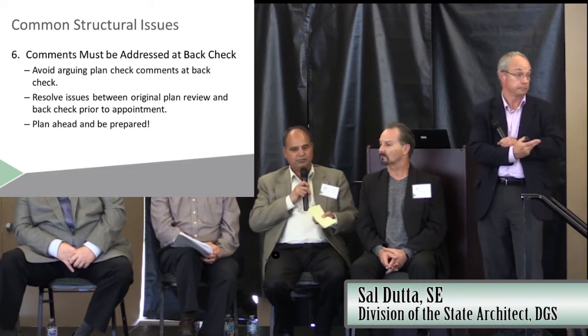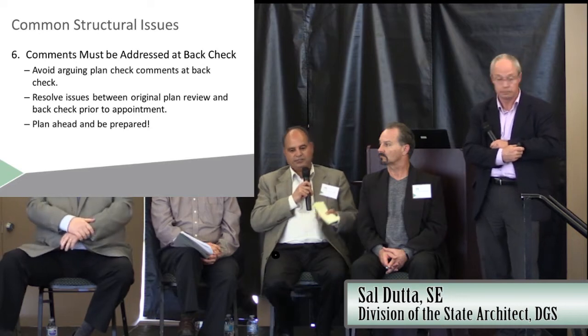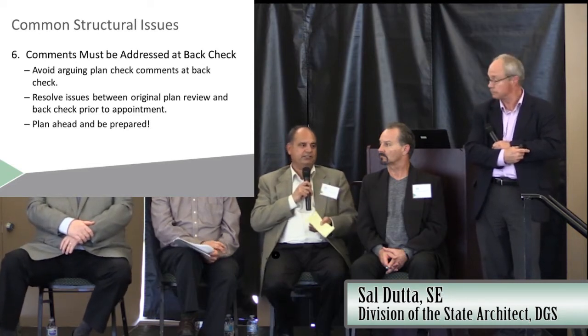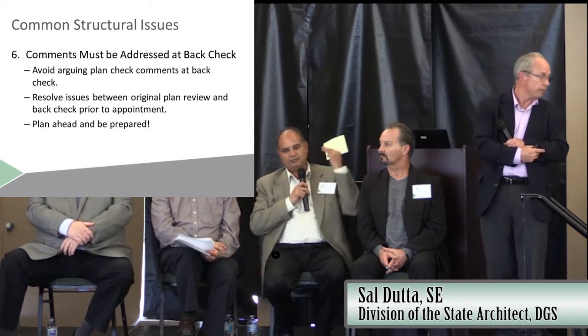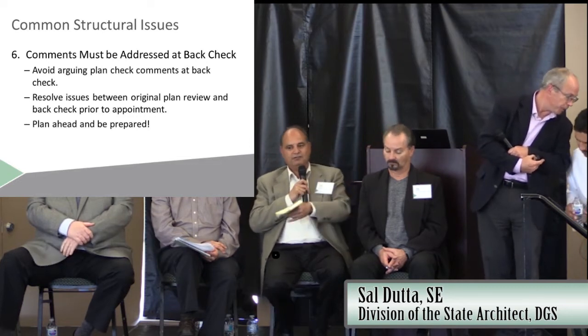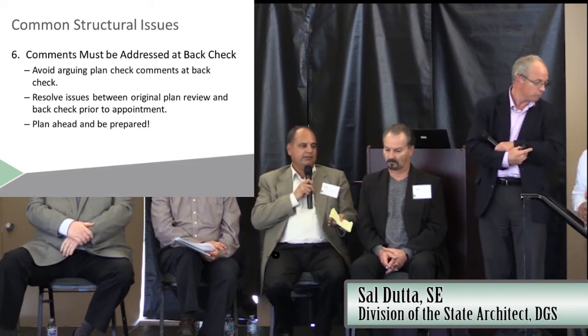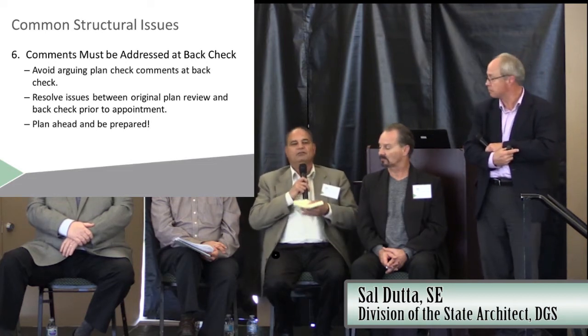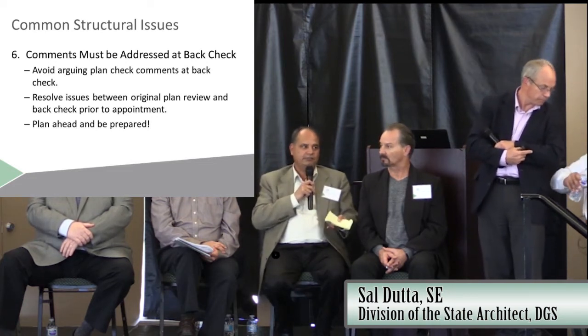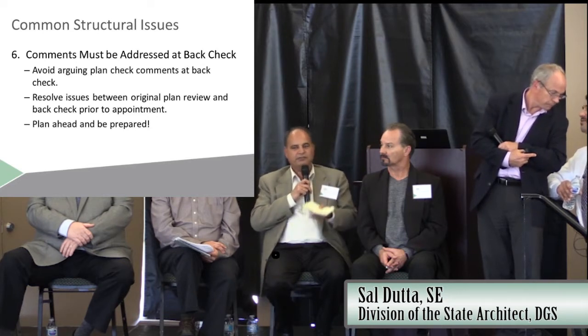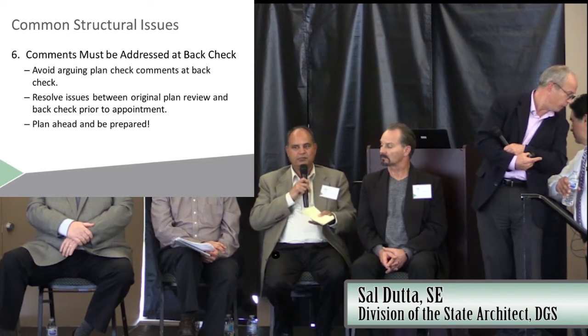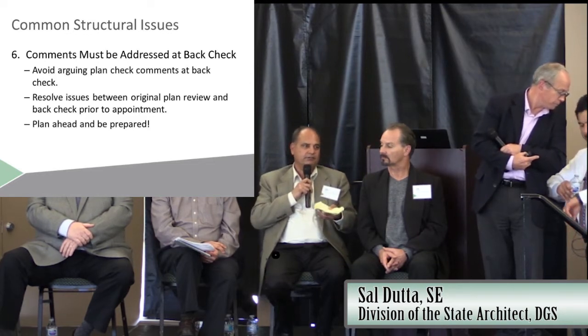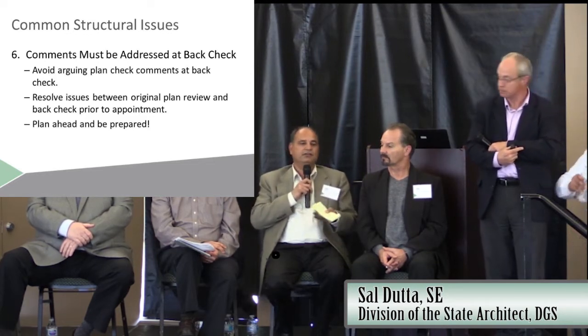I have had projects where a $10 million project took almost a week and a half in the back check room, and everybody was screaming. I had an out-of-town design professional staying in a hotel every day who couldn't afford to spend that much time. When you see a lot of comments, don't rush into back check. Submit your plans or scan them, write your response, and get an agreement with the plan reviewer in advance on major issues, so you're not spending all this time.